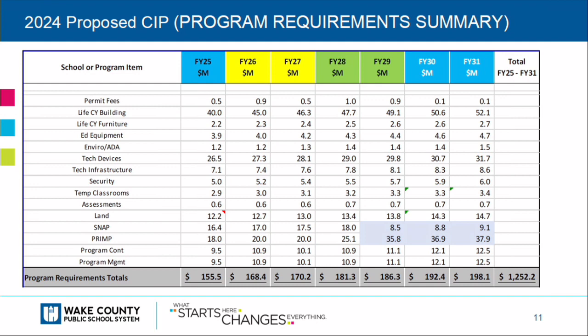Yeah, and it's something certainly that can be worked out. We'll have to see if there's any shortfalls, any issues. I don't believe that we've heard that has been problematic, but Mark may know more about that than I do. That's fine. I think it's also important to understand the value of land banking sites. As it becomes more and more difficult for us to acquire quality pieces of land, it's imperative for us to use that information to get ahead of some of the building in certain areas so we can acquire that land. Even if we don't use it at that particular time, we still have it, because it's easier to get it now than it would be later after the growth comes.